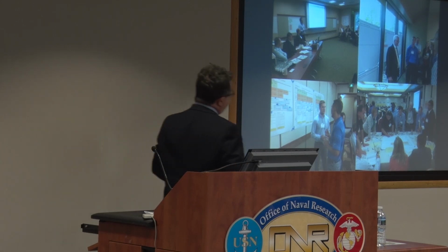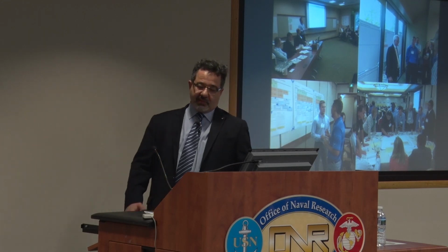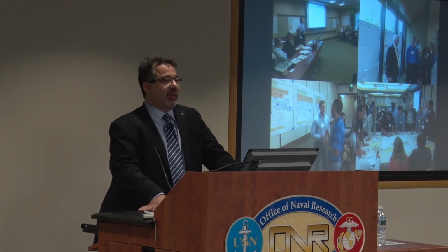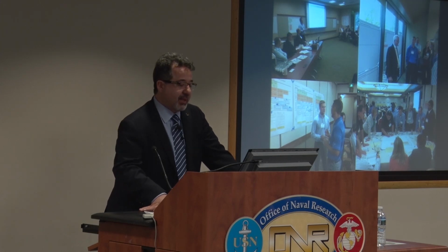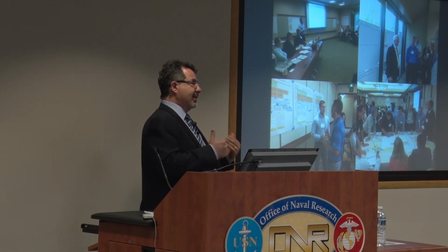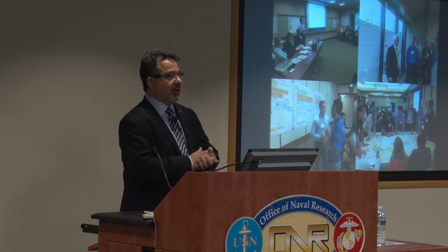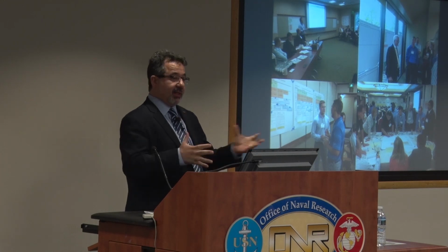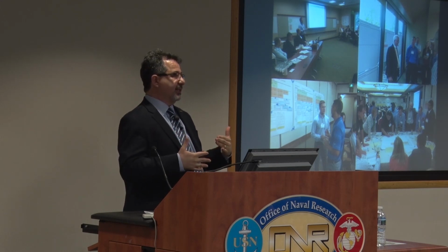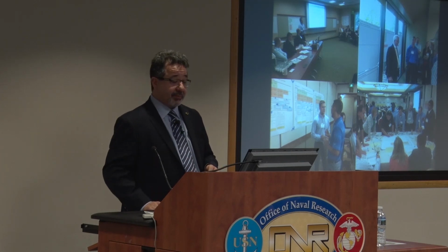Now, of course, when you have so many people, it gets messy, okay? So we initiated what we called the roadmapping police. We had a team of 10 people, one of us at each table, just monitoring and kindly interfering if somebody is trying to push something, or a really strong, opinionated person, so that others can also jump in. Also, when they are not really getting a deeper meaning, they just say improve it, but at what level, right? So that was really helpful.